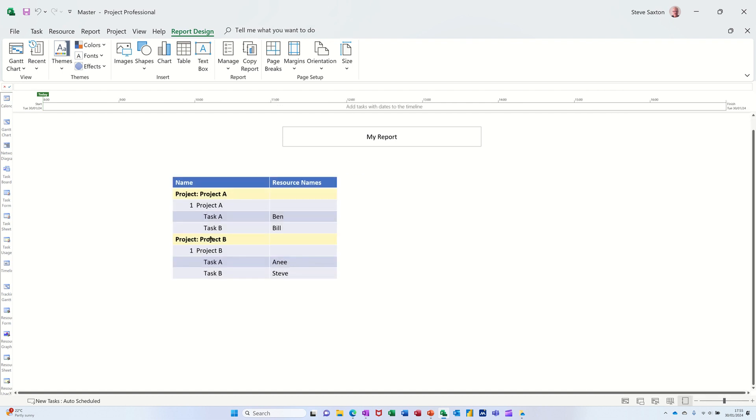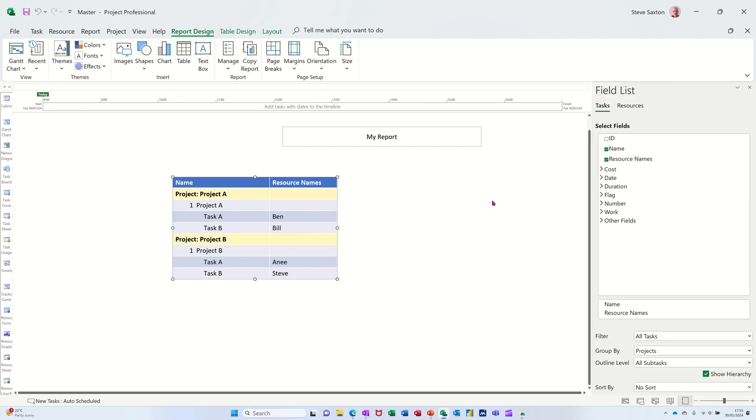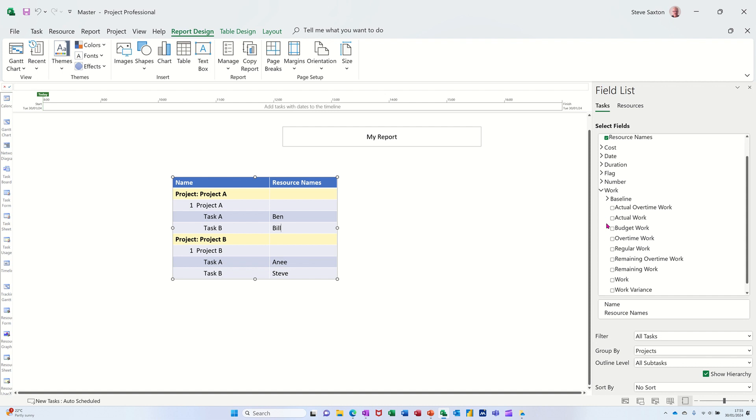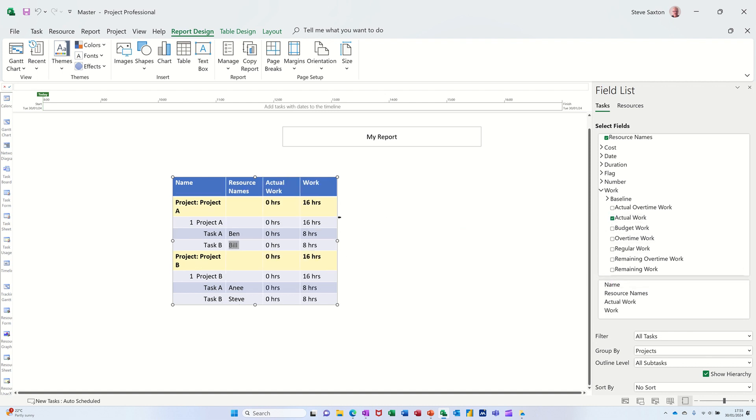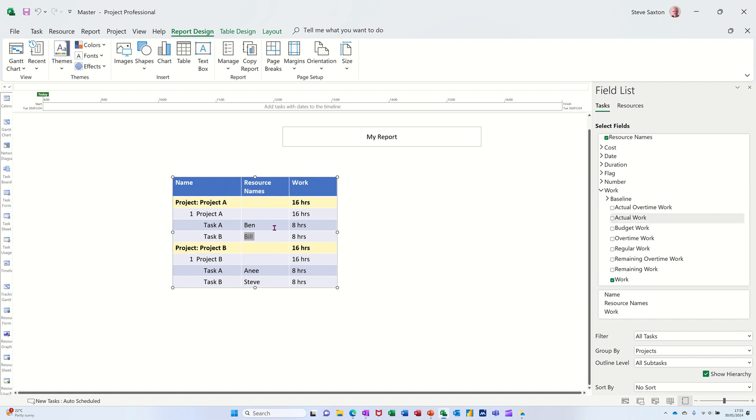There's each project. Project B, Project A, who's on what. Now, if you want to put the hours on there, you've got the work. You can put actual work there and it's giving you the hours. Or you can put the planned work based on their allocation, which is there. So you can see the breakdown. So I probably don't want actual work just yet because I haven't done anything. It's just been allocated.